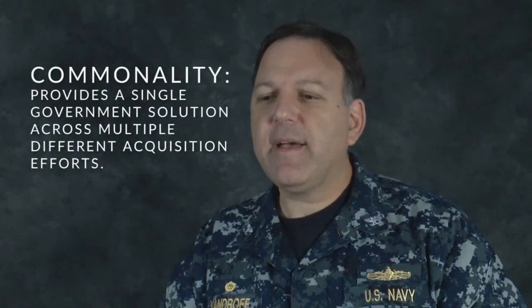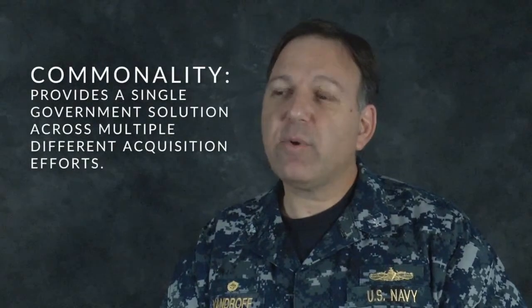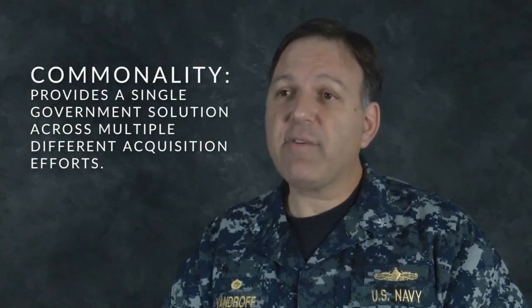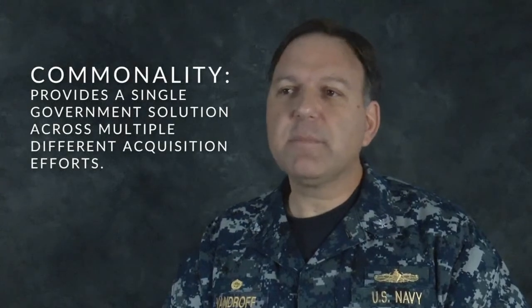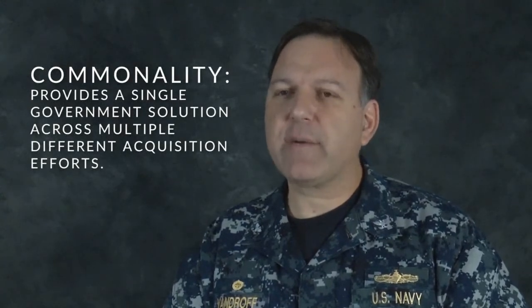Now, why would you have a PARM, right? Why would you do that? The first one is from a service standpoint, PARMs create commonality. It might make no sense for the government or the service to have multiple different solutions across different acquisition efforts. And again, I use the classic example of a radio. You might have 6 or 7 different ship programs. You don't want them to all have 6 or 7 different radio solutions. You want them to all have the same radio solution. So you create a program for the radio.